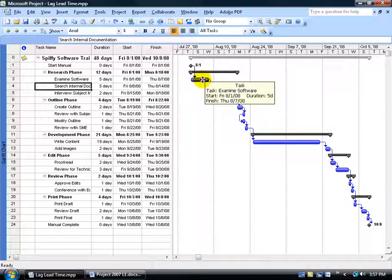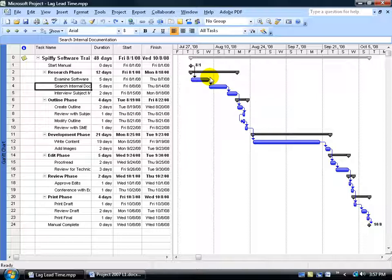First of all, let's pretend that this task is pouring cement. Once you've finished pouring the cement, do you want to jump right on top of it and start your framework to build your house? No. You want to wait for it to dry. So you can give it some delay or lag time of a couple of days. When it's finished drying, then have the framers come in and start building on top of it.